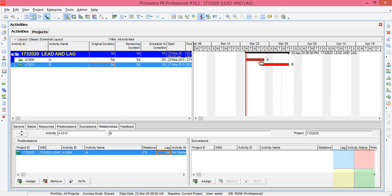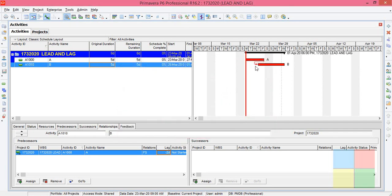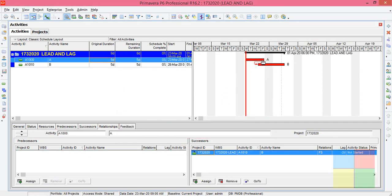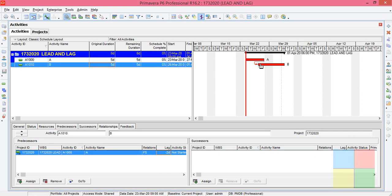The A activity will finish on Friday. At the same time, B activity will start on Friday. If I change it to minus two and update it, A activity will be finishing on Friday, but Thursday itself the B activity will start.